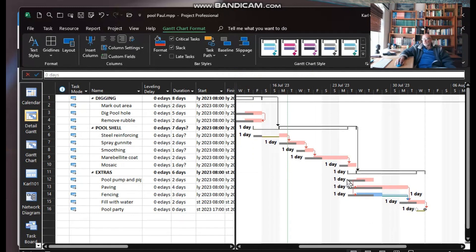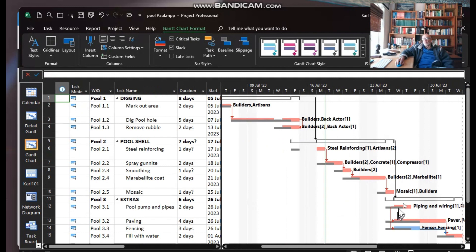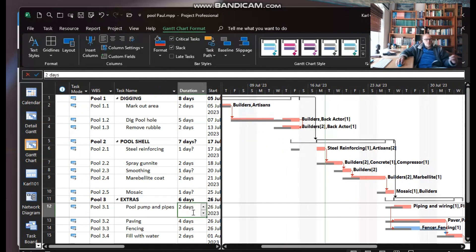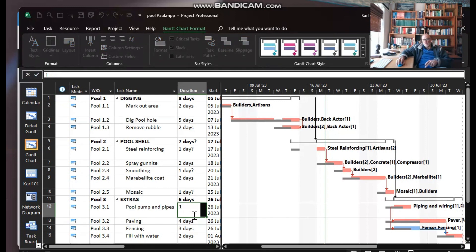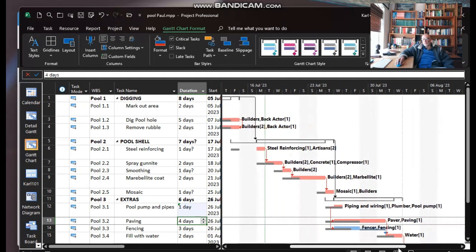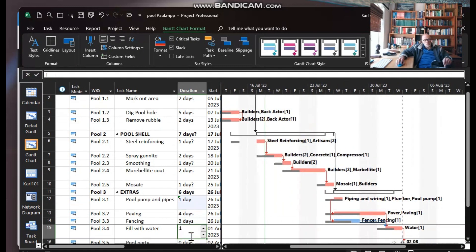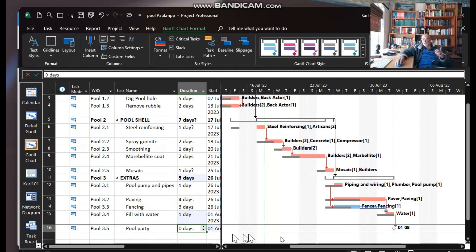Having done that, we now can work out how to pull back the critical path. And of course, that would mean we probably need to solve it by pulling it back here. Let's say pull that back to one day over there. That pulls that back, but unfortunately we're still off even though that was a critical task. Let's say we can fill with water one day. There we go, back on track over there, having slipped off over there.